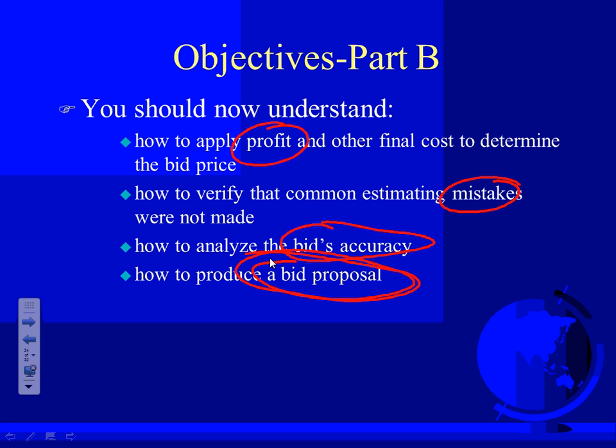So I hope I told you guys how to do receptacles. You basically go from receptacle to receptacle with MC cable all the way to a junction box, and then EMT all the way to the panel. Lights, Derek, same thing. MC between them to a junction box, all the way to the panel. Mechanical equipment, you take conduit all the way to a disconnect and then flexible metallic conduit, tie it to the equipment, or liquid tight.